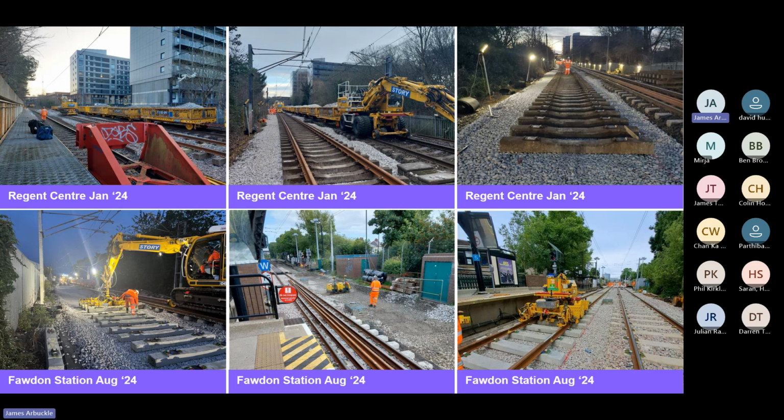If it's more adversarial, that's when it becomes more challenging, because you're having those more difficult discussions in the background. Correct me if I'm wrong, but we did this on our normal T's and C's, not an NEC contract or anything, so we had full discussion about any changes, anything was recorded between both parties, and nothing was done unless it was instructed. That's because we have a limited budget, as I said before, and there are certain things we as a project team can't do without getting approval from up the line. So it worked well, I thought. I hope.